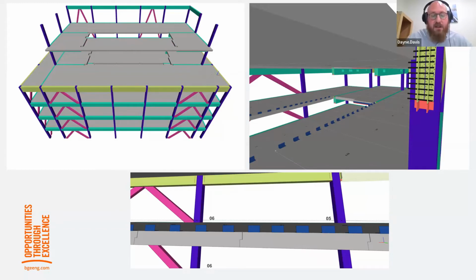It also gave the builder flexibility. They didn't have to go to just one CLT manufacturer to finish the design. In theory, we designed this building for radiata pine because the mandate for the project was as much local as possible. So CLT comes from Australia, but unfortunately, we really wanted a glulam manufacturer from Australia, but we couldn't get it in the right lead time. They had about a year's lead time at the time when we approached them for this project. So then we had to go to Germany to get it. But it also gave us complete flexibility. We went to 6 glulam suppliers to get a price, and they had much more ability in negotiation because the design was 100%, and they knew it was a project ready to go.